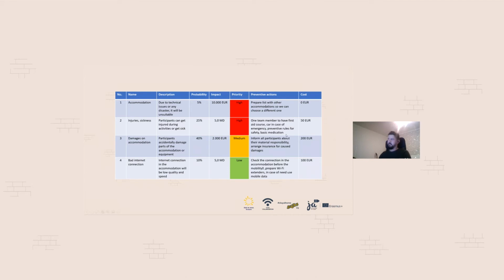And the cost is, because of basic medication, let's say I counted, it can be around 50 euros. So buy some first aid kit, buy some basic medicine for stomach problems and for fever, and a thermometer and whatever, and with 50 euro, you did a kind of big job with this, because you can avoid or deal with the basic sicknesses. And if something happens, then you know what to do, and it doesn't cost you money. Maybe 5 man days would be the impact, as someone will need to deal with this, the transport to the hospital and communicating with the locals and stuff.